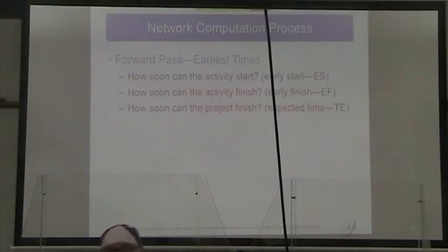When we do that, we do what we call the forward pass. The forward pass tells us the earliest times for all activities. How soon can the activity start? The early start. How soon can the activity finish? Early finish. And how soon can the project finish? The expected finish time.